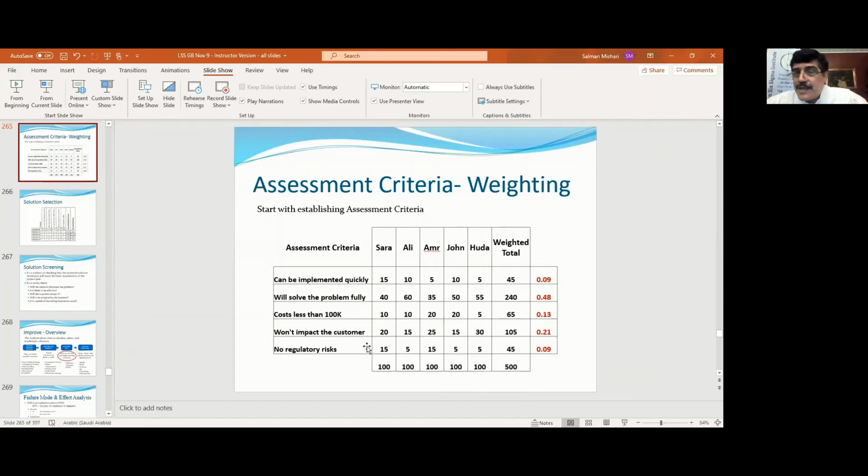These are all called assessment criteria. And how much weight do we want to give to each criterion? This is how we do it. We ask Dr. Hawra, we ask Dr. Fayyad, we ask Fatima, we ask Ahmed, and so on. Everybody gives us a number, and based on this, we create a value, basically a weight, for each assessment criterion.